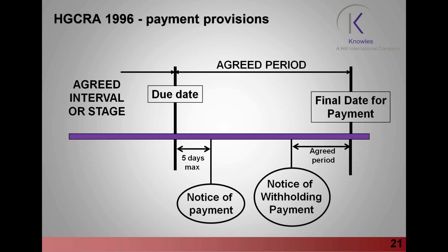What the parties have to do is look at the facts of what has actually been done on site. You have to prove what was due for payment. And if you can't prove what was due for payment, well, to be honest, the notice of payment isn't important. And indeed, this notice of payment was actually described as a technical breach only.